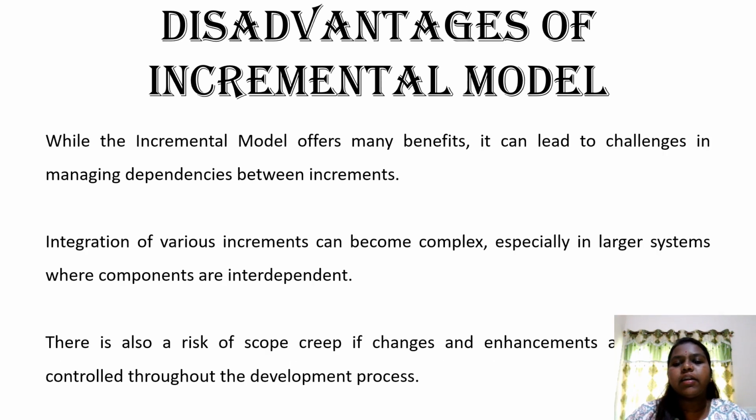Disadvantages of incremental model. While the incremental model offers many benefits, it can lead to challenges in managing dependencies between increments. Integration of various increments can become complex, especially in larger systems where components are interdependent. There is also a risk of scope creep if changes and enhancements are not controlled throughout the development process.